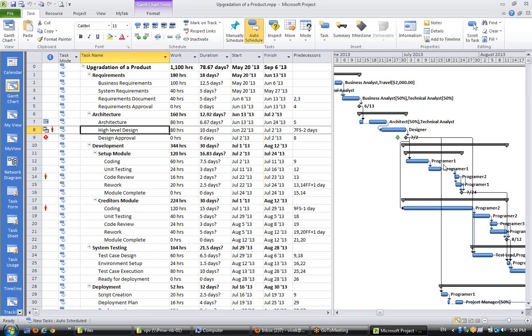But the downside is that your efforts increase. In percentage complete, your efforts are minimal. If you provide duration, your efforts increase. When you provide work, then your efforts are even more. And if you provide on a day-to-day basis, it's very difficult. It becomes too tedious for a person to do this and also manage the project.